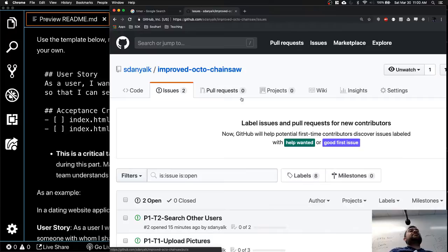What this says is that we won't deliver a product in 6 months. We will actually deliver in like 2 weeks. Now people are like, what? Instead of 6 months, I have to deliver the product in 2 weeks. So what happens is you divide your 6 months project into 2 weeks milestones, basically. Yes, it's not delivering the whole project. So you say in 2 weeks, I can do this. And after 2 weeks, you actually show it to your customer.